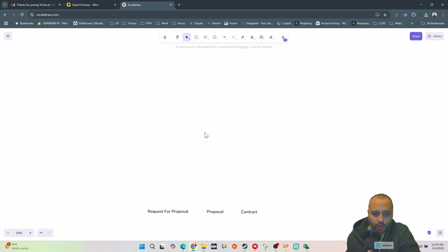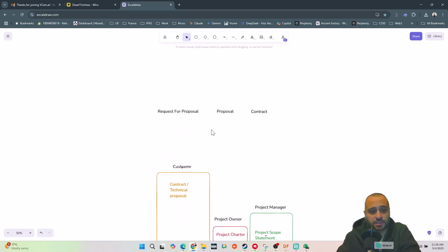Generally, when a project starts, it comes from a request from a customer. There is someone who has a need, and that project is going to fulfill that need. Generally a customer, or a company as a customer, is going to write a document. We call it an RFP, or request for proposal, and share it with different people, individuals, companies, vendors.